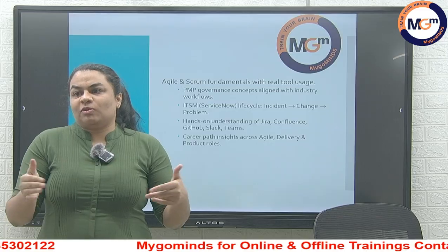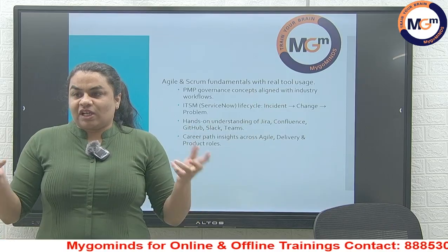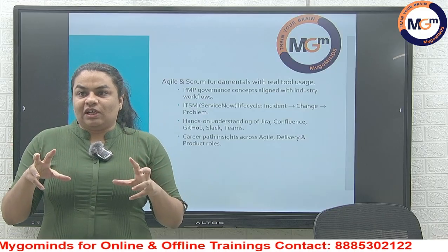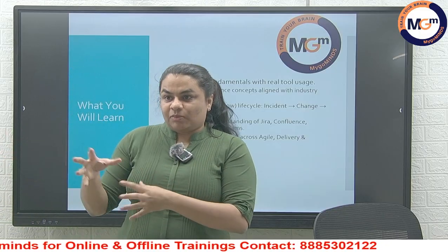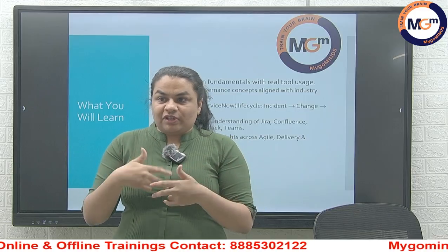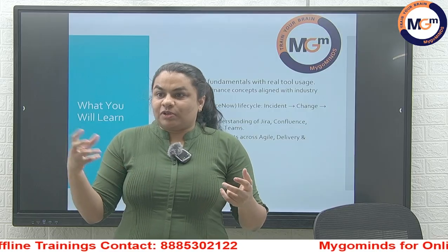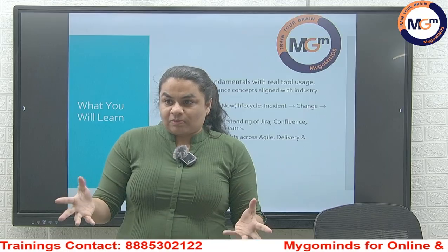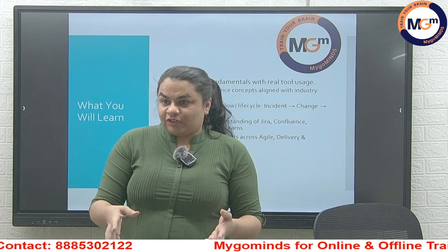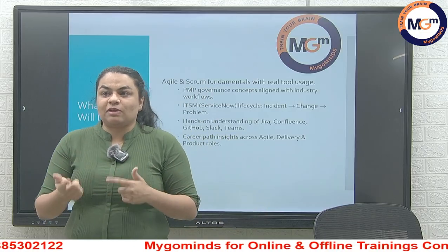When it comes to the waterfall model, once everything is done, then you will get an update. So if there are any changes or upgrades, agile is more feasible from a business point of view for any project or company. Iterative means whenever the client is in line with the every 2 week or 1 week sprint, whichever the company follows, there will be upgrades and inputs from the client, depending upon the sprint cycle. It will be more useful for us because there will be back and forth feedback, and it will be more useful for us to develop that way.